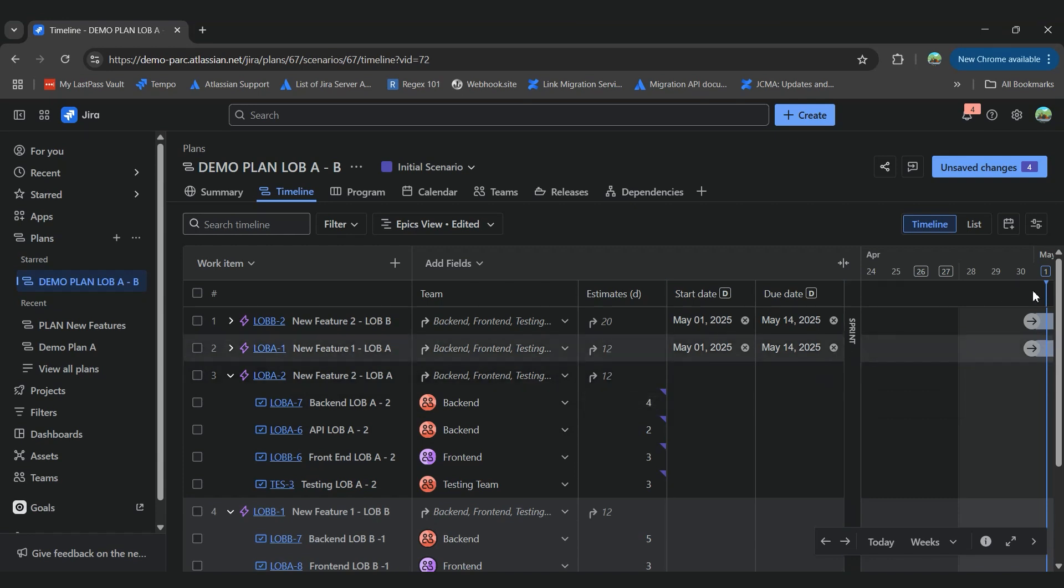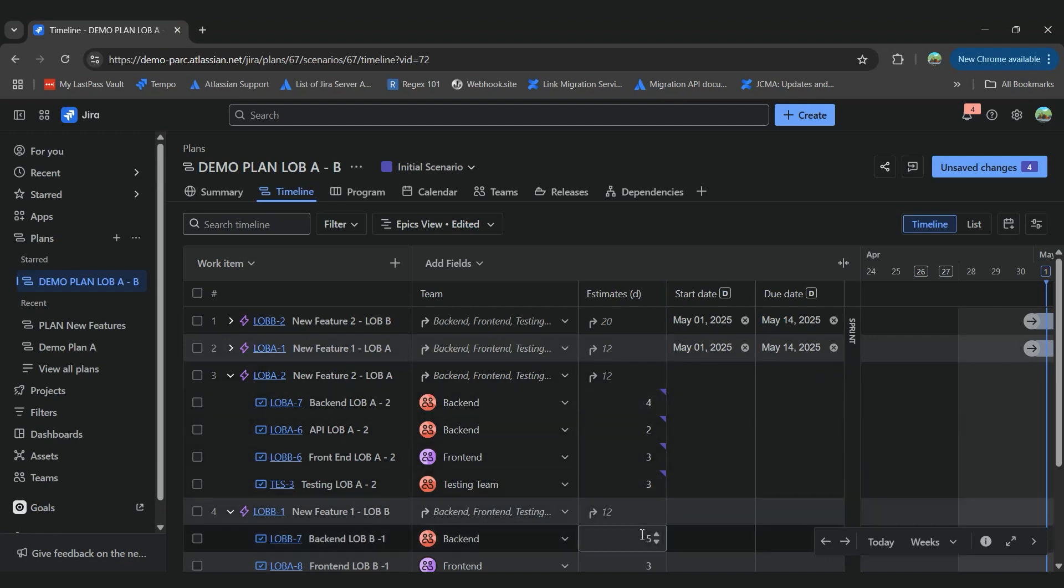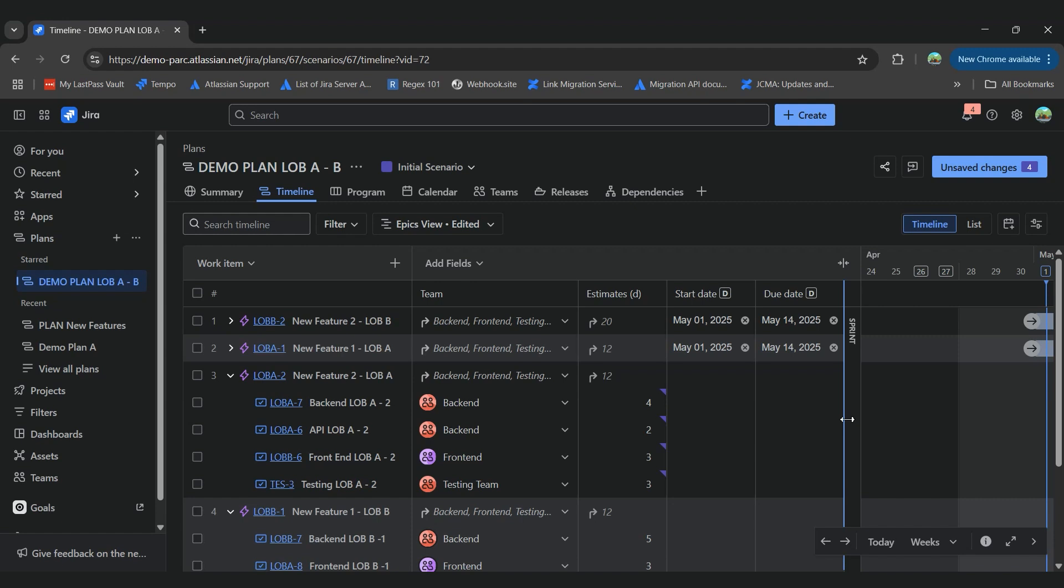The auto-scheduler will take the information about the team's capacity, the estimates that we're given, and it will auto-populate the start, due date, and it will assign it to a specific sprint.